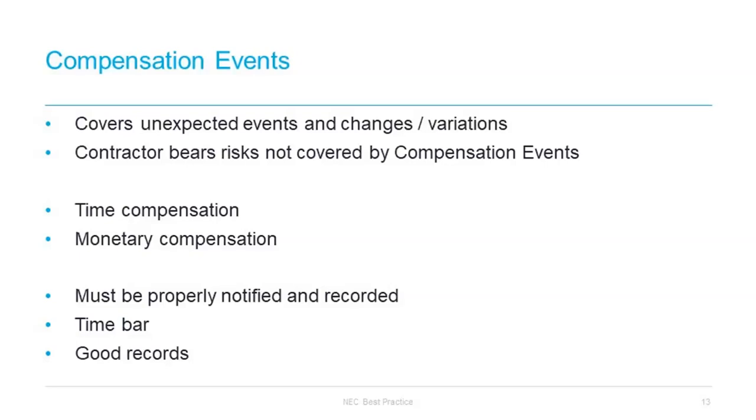If the employer seeks a revised quotation, they need to explain the reasons why, what's got to change in that quotation. If the employer doesn't reply to a quotation on time, the contractor can notify the employer of this. If there is still no reply from the employer within 2 weeks, then unless the compensation event is for a proposed instruction, the contractor's initial notification is treated as an acceptance of their quotation.